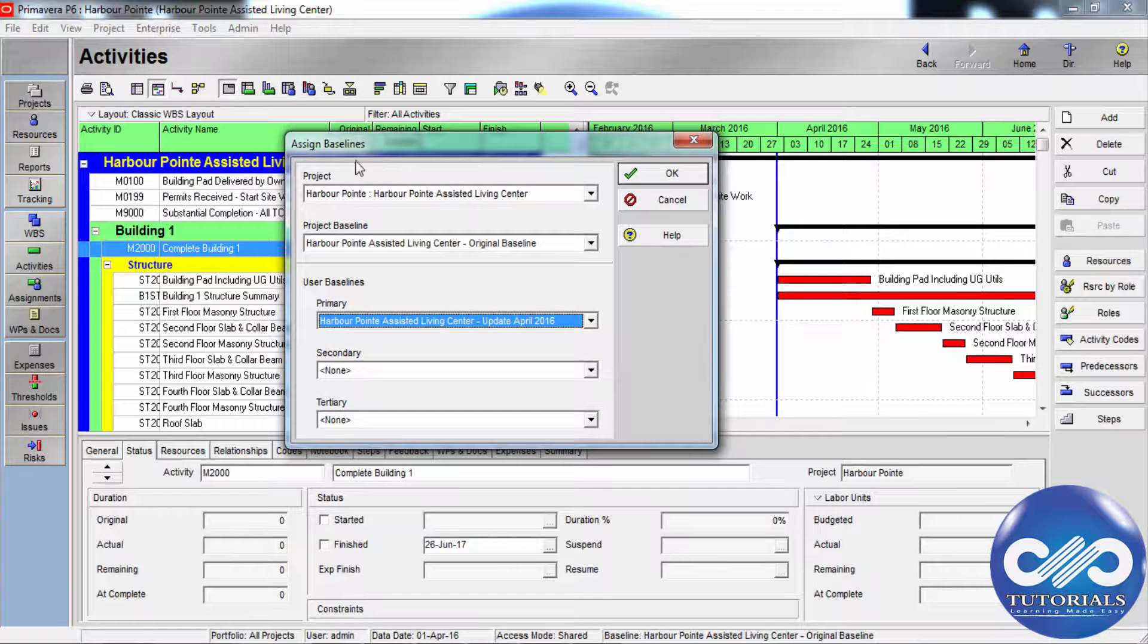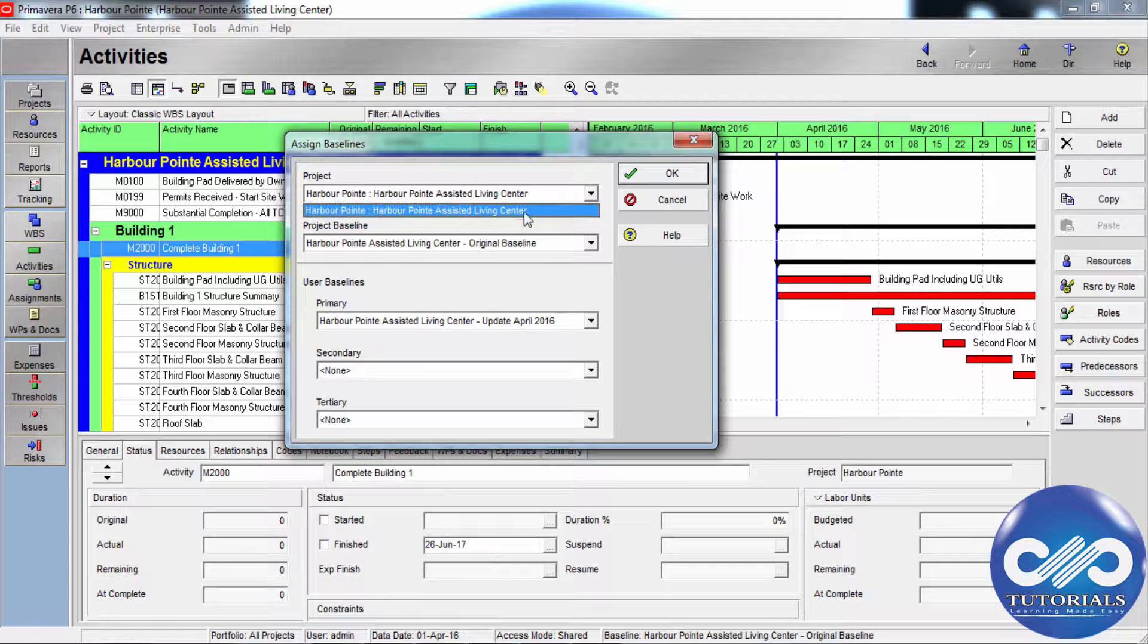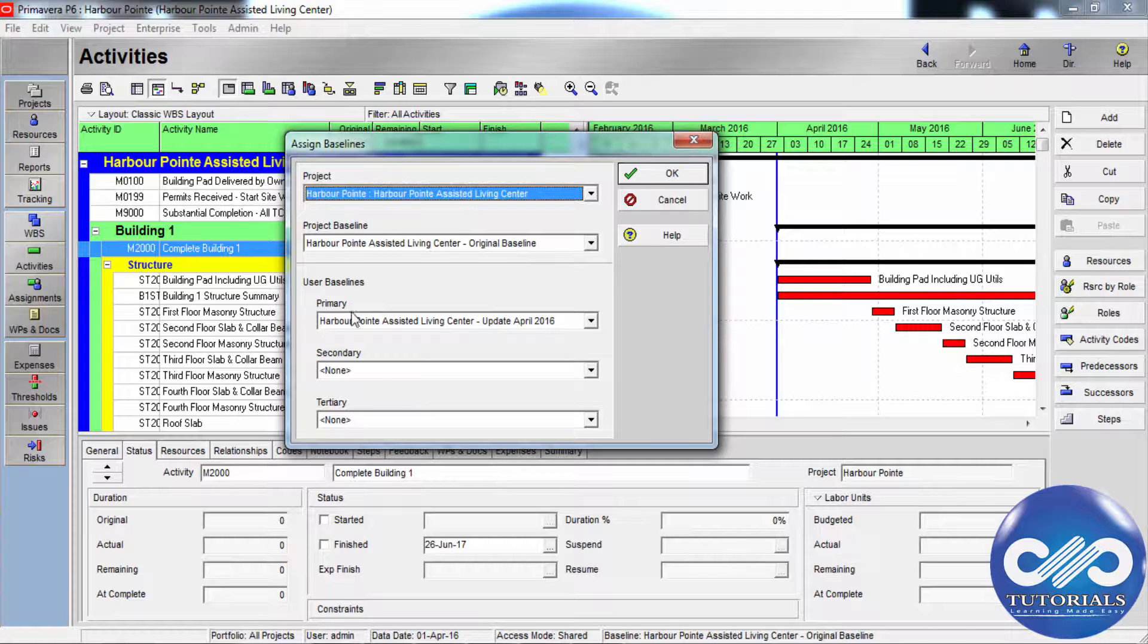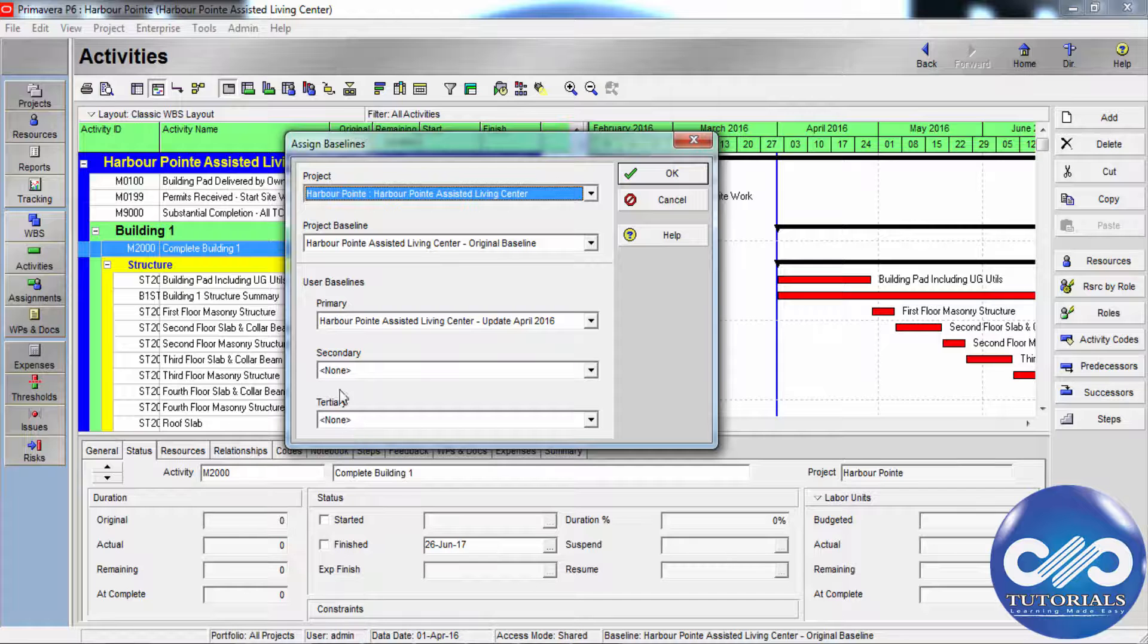Now, use the assign baseline dialog box to designate the current project or an existing baseline as the project baseline or primary or secondary or tertiary baseline.